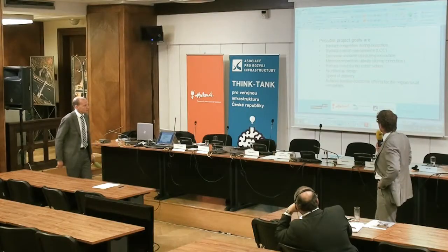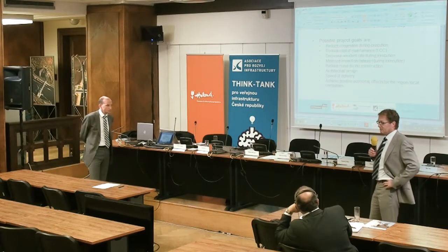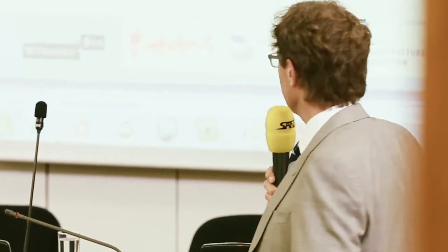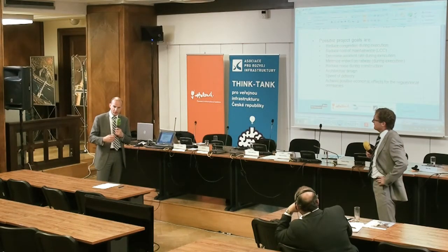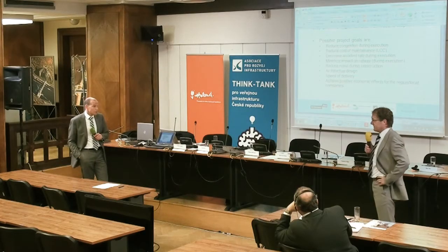We don't. Okay, minimize impact on railway. That's a good one. You know, the railway is very important, so the risk of something happening that causes the railway to stop, you don't want that. And I think in Holland also, if the railway is interrupted, then they have like a slot, and it has to be allocated far in advance, and you want it to be as short as possible. So the trains keep on running. This is a really good one, I think. Reduce the noise during construction. That's a good one. It can be measured very well.